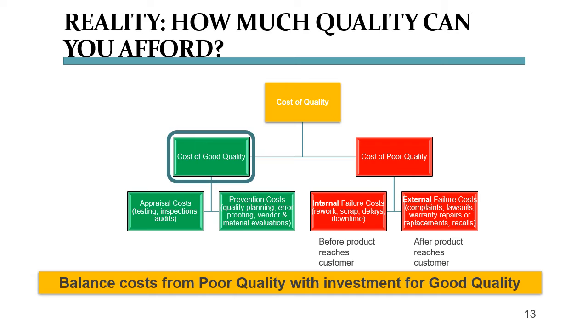your production cycle. This can be the cost to spend extra time on testing and audits to make sure that you've followed best practices and all legal requirements. It can also be prevention costs to make sure that you've planned all your supplier audits, internal peer reviews, and any other checks and rechecks to ensure that you deliver bug-free code and error-proof systems to your customer.